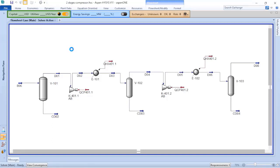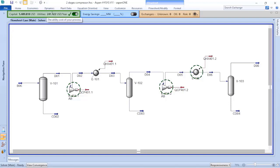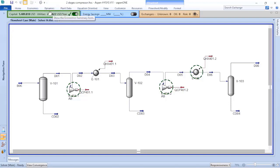It will perform calculations related to cost, not only capital but also operations. Here you can see that the capital is 5.5 million dollars and utilities cost is 240,000 US dollars per year.